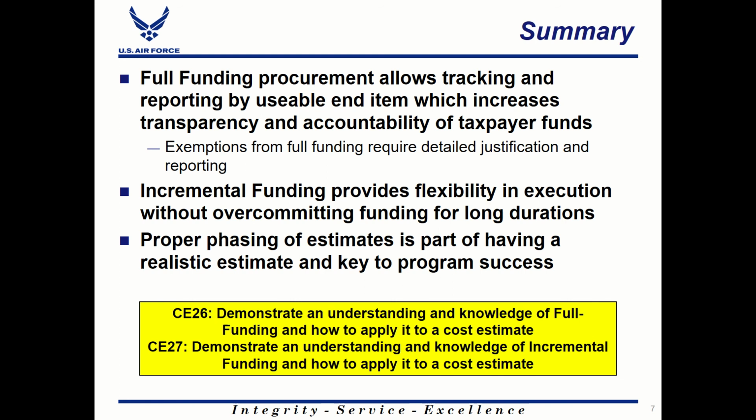If the program doesn't have the money when it needs the money, the program's going to have problems. Whether that's money too early or too late, it can cause problems for the program, whether that's additional oversight or having to slow contractors down or stop work or other problems. Again, we want to make sure that we're providing realistic cost estimates and then producing realistic budget estimates to make sure that these programs are set up for success.